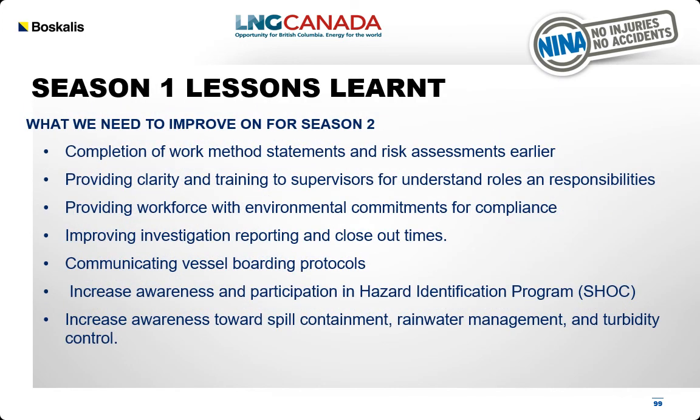Season 1 Lessons Learned. What we need to improve on for Season 2. Completion of work method statements and risk assessments must be performed earlier. Provide clarity and training to supervisors for understanding roles and responsibilities. Provide workforce with environmental commitments for compliance. Improve on investigation reporting and closeout times.